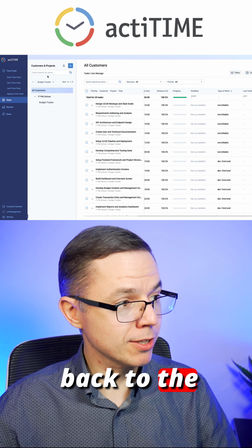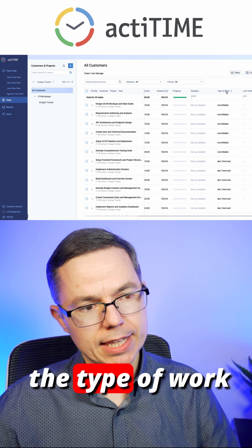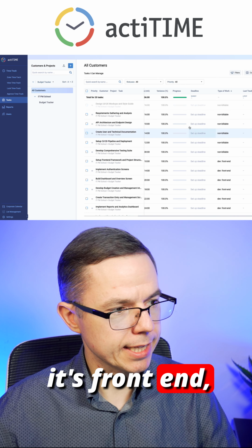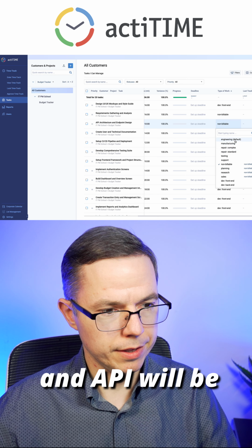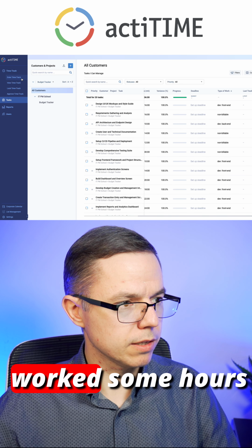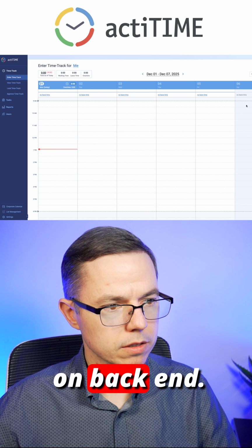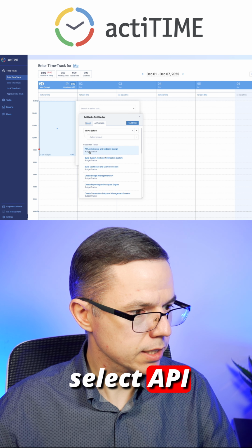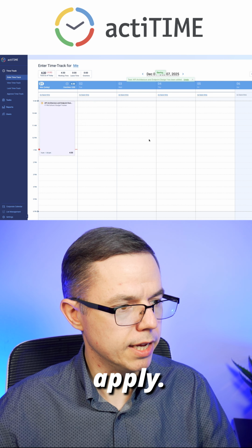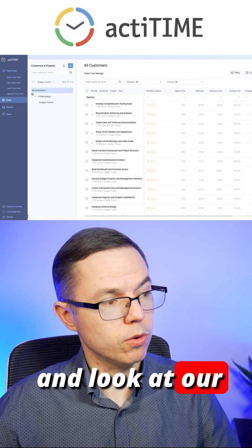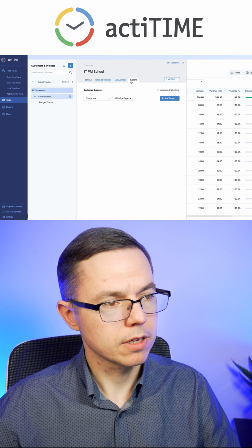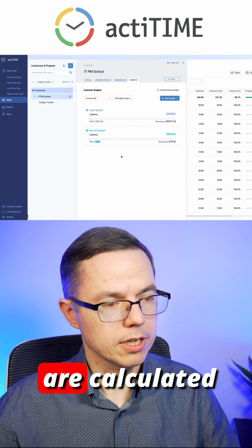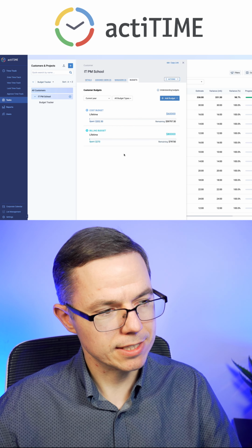So if we get back to the tasks, we can set the type of work here. For example, design of UI, let's say it's front-end, and API will be back-end. Now let's assume I worked some hours on back-end. And I'll go select API, apply. Now if we go back and look at our project's budget, we'll see that costs and billing budget are calculated based on different rates. So you see the point?